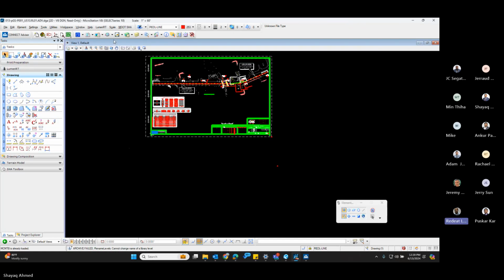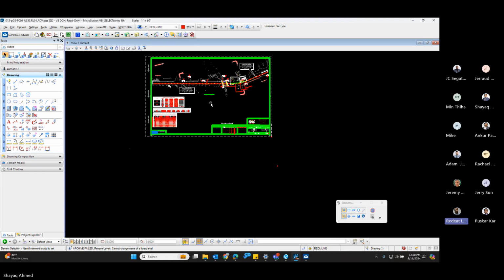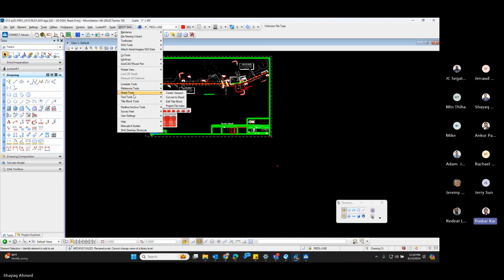My recommendation is not to archive the title sheet, because this title sheet probably is not what the contractor has. It will have all the signatures for PRD, the SHA, the OHD, director's signature. Typically when I do it, I don't even bother about this. I'll just use a PDF and make the change, because otherwise you have to bring all the signatures into the redline drawing that we change just for the title sheet. So that is one way to do it.